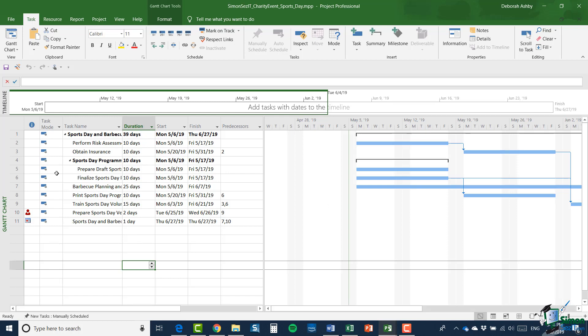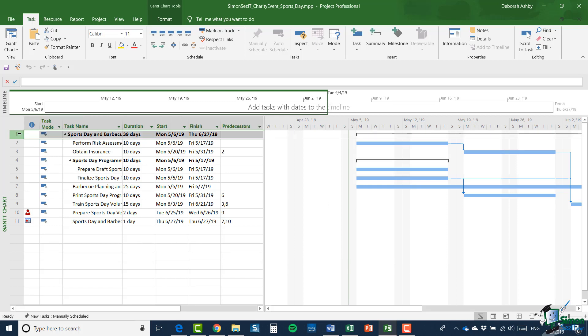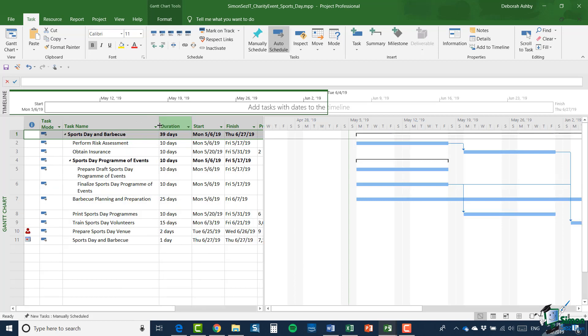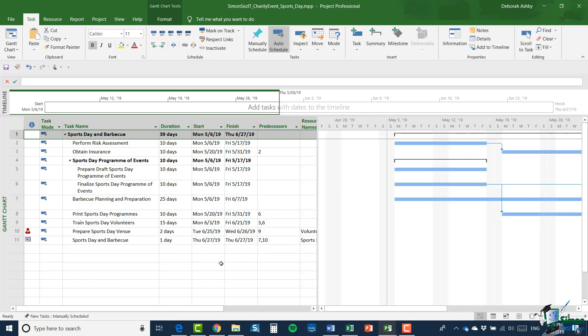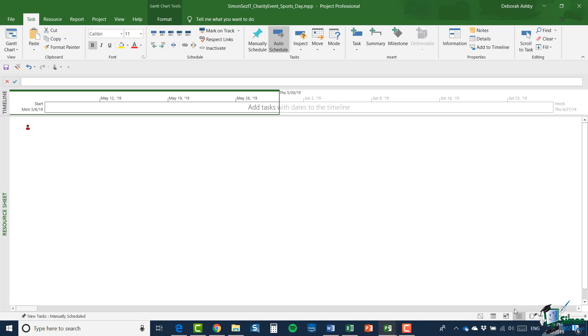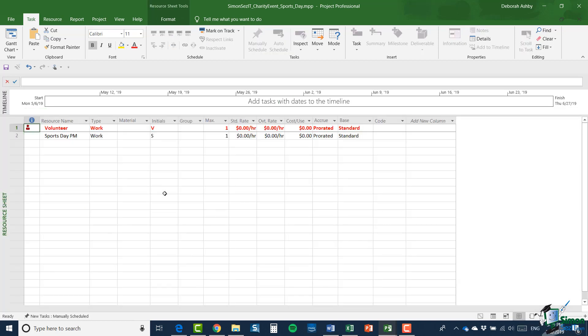Now what I'm going to do is to save this particular project as a separate MPP file. So I've saved in the project course files folder and I've called it charity event sports day dot MPP. Now there are a couple of important points to make here. One of them is that when I copied the block of tasks, I copied the summary tasks, sports day and barbecue itself as well. And I want to return to that point a little bit later on.